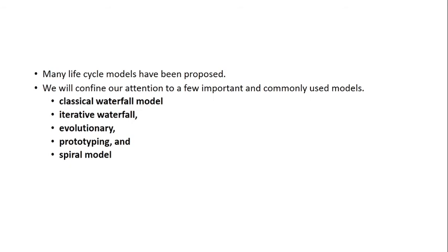Say you are supposed to develop a large and complex project, but the requirements are not clear. So how will you proceed? If requirements are not clear, the work you do may lead to failure, because maybe the requirement says something else which was not clear earlier, but as you proceed, it got clarified and it was something else and we developed something else. So what we do in that case is we prepare a small scale product with limited functionality and dummy functions, and then we check whether it is working properly on a smaller scale. If it is working properly, then based on the requirements we have gathered from that prototype, we develop the actual system.